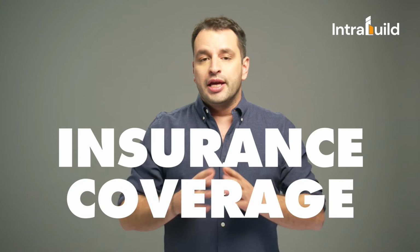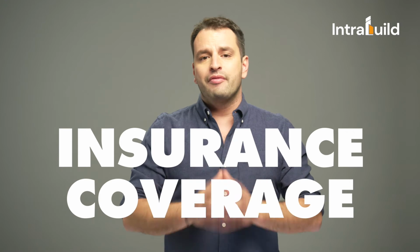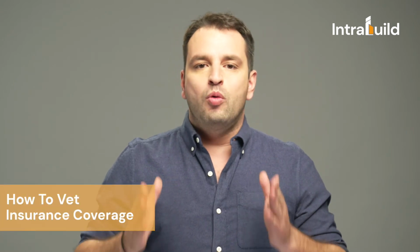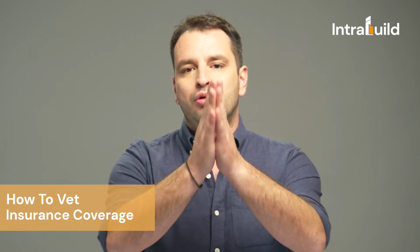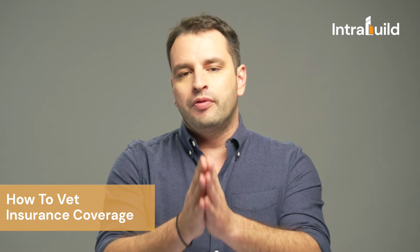Number 3, and one of the most important steps of vetting, is insurance coverage. You need to make sure that your general contractor has adequate coverage for every single part of your scope of work. You see a 2 million general liability and a 5 million umbrella and you think you are covered. You are not. Based on the New York City labor law, any worker of any subcontractor that walks into your apartment or into your home can sue the homeowner. You are responsible for their safety.